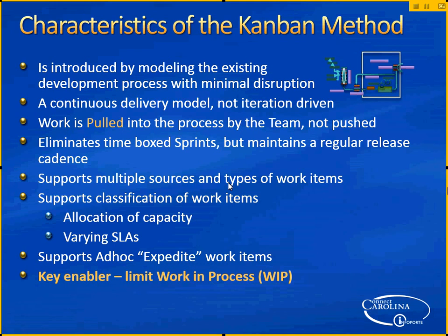You can allocate capacity. You can say based on history, X% of our time is used for defect support in production, X% is used on maintenance of the environment, and X% is available for production. And you can set those parameters and allocate your capacity accordingly. And over time, you can start setting SLAs, but I'm more looking at service level objectives based on the type of work that you're being fed.